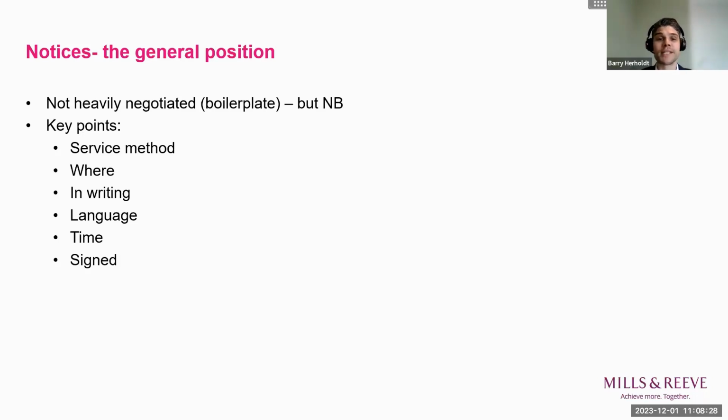And then we get to the next point, the timing of the notice, by when it must be served or when it gets treated as deemed service. Timing is quite important because if you want to avoid any time bar issues, you can understand why. Check if any prescribed periods are stated in which certain notices need to be served under the contract. Be alert to contracts that go further and expressly set out specific business hours. To avoid any uncertainties, it's always good to include clear details or a table that sets out deemed service periods. As an example, you can state in a contract on the day of delivery if delivered by hand or by email, or on the second business day after the day of posting if it was sent by prepaid post.